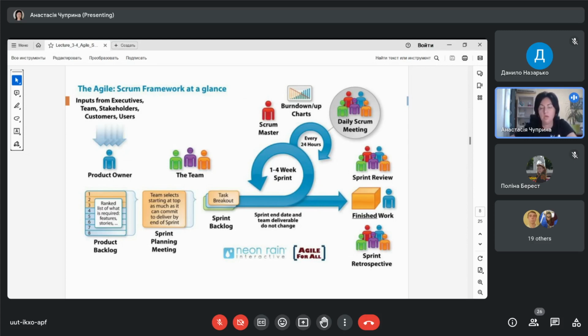I will write in the chat. For example, you have 5 persons in your team, 5 students. You multiply it by the number of days you have to work, so you multiply it by 10 days. Each team has to identify and agree how many hours you will work each day. In real life, you work 8 hours, so in real life you will multiply it by 8 hours.